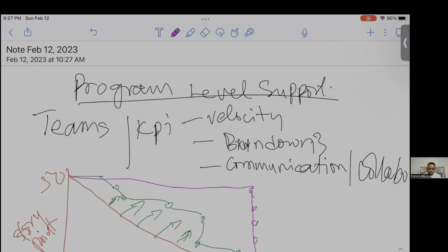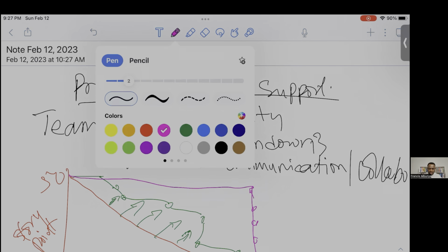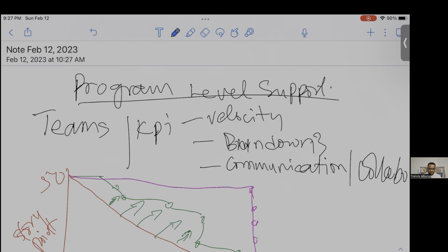Now, your team becomes performant when your team starts having a chart that looks something like this, right? We start the first day, we start burning down. It goes like this. Maybe we burn down, we burn down, we burn down, and then we finish almost about this. Now, what is happening here is that this is a super performing team, because this line, the red line in the middle, is what is expected from a different team. So with your burndown chart, with just a peep, you can easily see if your team is running behind schedule or your team is working in line, and that helps you to give them a boost.